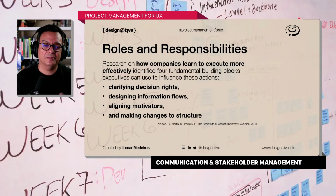And again, some companies say, no, we are a very flat organization, but at the end of the day, someone owns the decision, because who's going to be accountable for that decision later? It makes a lot of difference in the level of commitment that you're going to get. Who owns each decision? Who must provide the input? Who's ultimately accountable for the results of that decision? And how are the results defined, right? So if you have clarity around these, that's another layer on top of those matrices that we were talking about. And we're going to go to another diagram that helps clarify all of this.